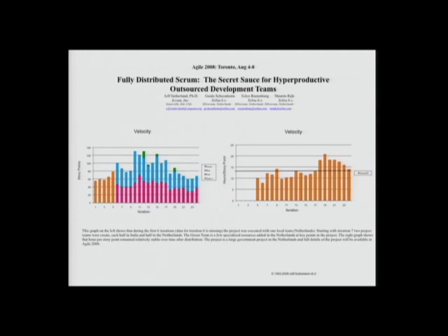And it was at around iteration 7 that they distributed. So it popped up slightly, then went down. So roughly the same. Here it started to go up. And when they started to do an analysis of why the cost went up, they found that the team was going faster. But in going faster, they were creating more bugs, and the rework was driving cost up. So they actually slowed the teams down, and the cost is coming right back down to where they want it. So you have to be careful about going too fast.